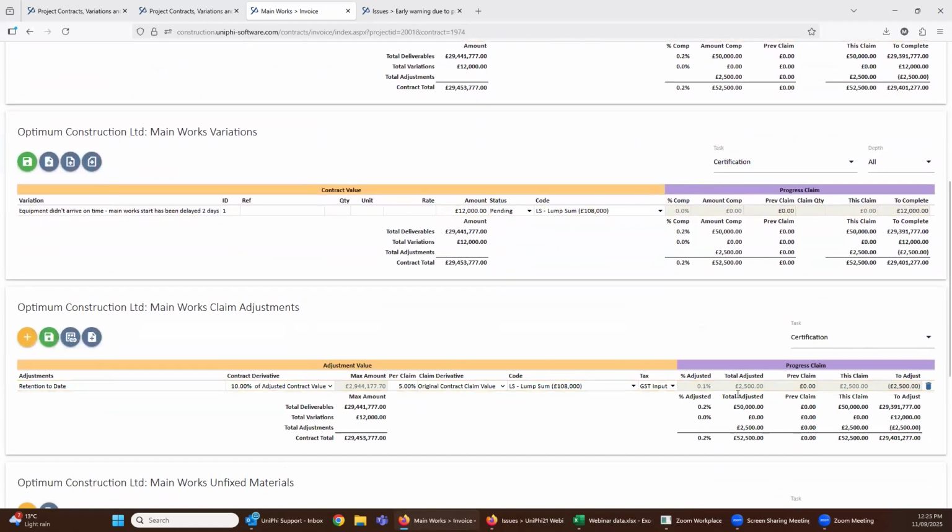So it's going to, and I've entered it in the wrong way, it should be a negative if you're going to deduct. In some of our jurisdictions, they actually give advances. So we had to make this a little bit less intuitive than I would have liked, in the sense that advances are positive numbers where they actually pay a contractor up front, and others are negatives. And so we need to make it go like that to get that to be correct.